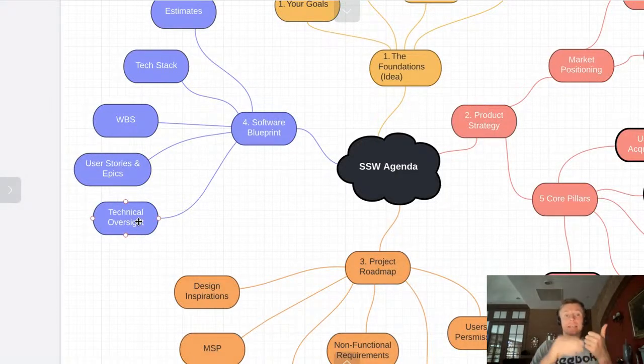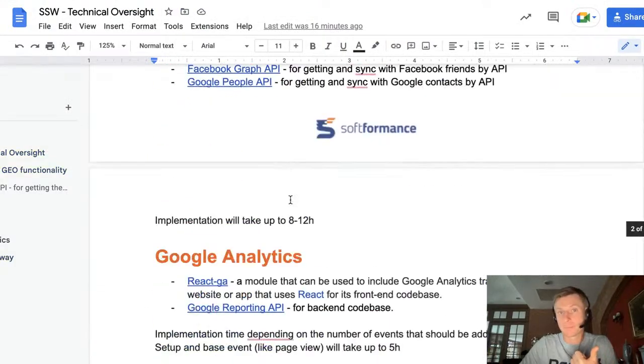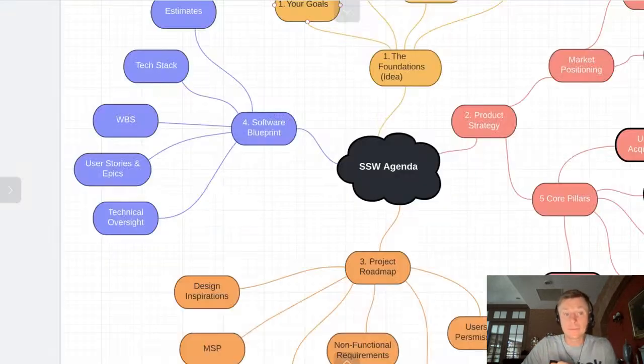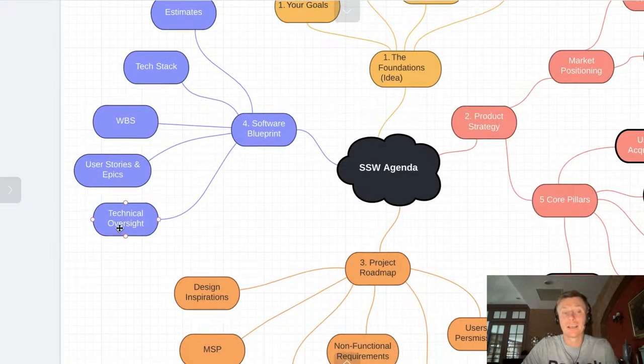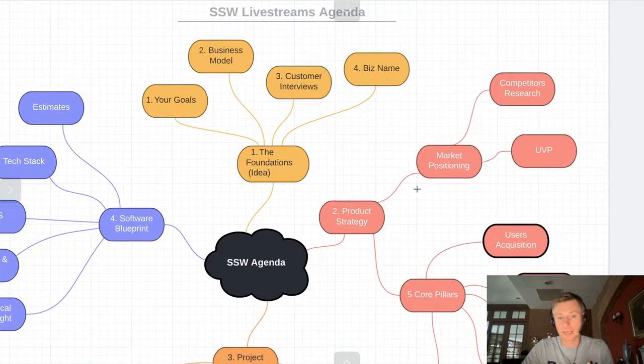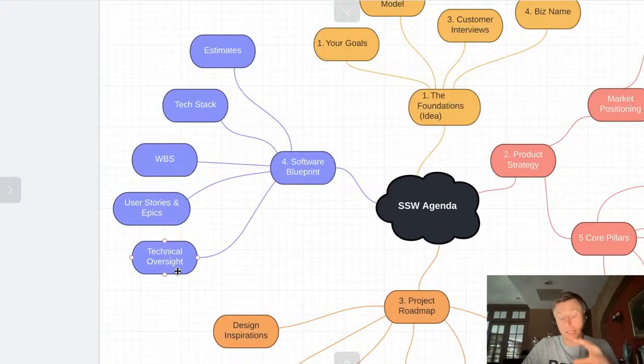So usually it's quick technical research in the format of this document and the next steps and efforts. Plus, sometimes we need a deeper dive on each of these tasks and do real coding, doing kind of proof of concepts that it's working or not. With that information, we will understand what is doable. If something is not doable, we'll remove it from the MVP or adjust the idea. We'll go back to product strategy at all and change it. Or, it's doable.